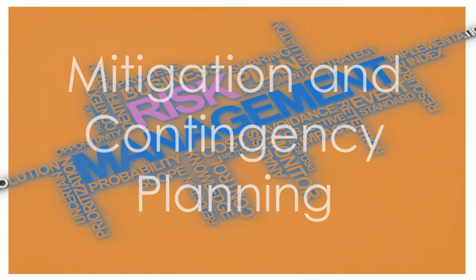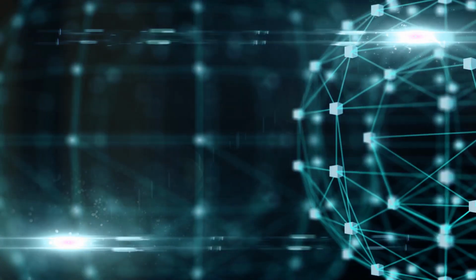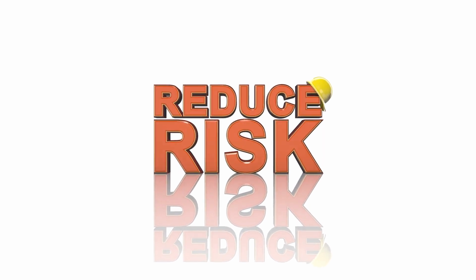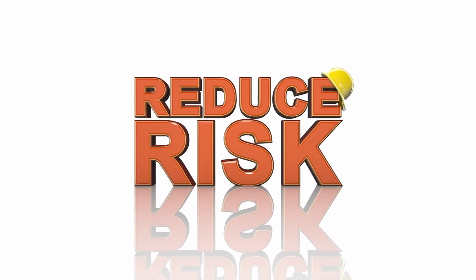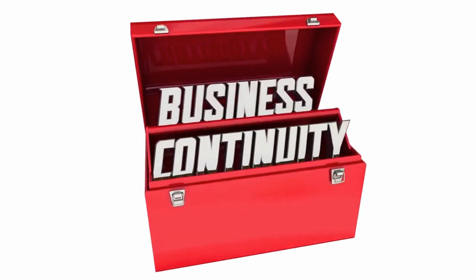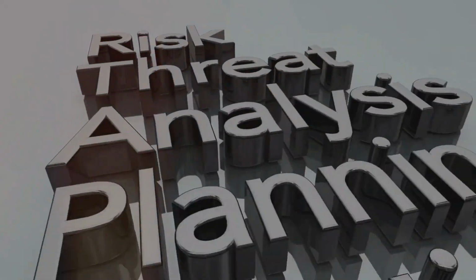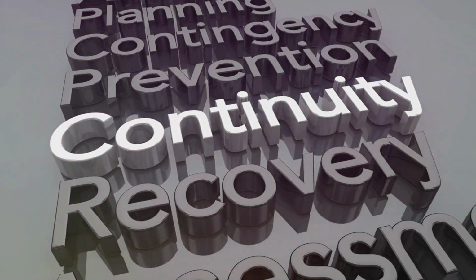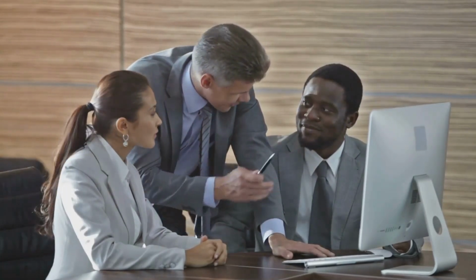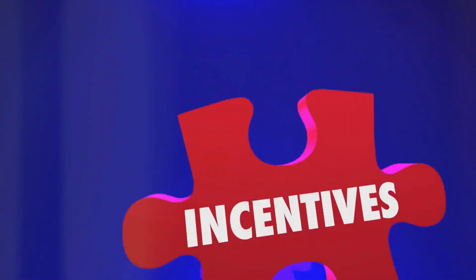Once you've identified potential risks, it's time to build your defenses. This means developing a robust risk mitigation plan that outlines specific actions you'll take to reduce the likelihood or impact of each identified risk. Think of it as your insurance policy against potential disruptions and setbacks. For example, if you've identified resistance to change as a potential risk for your CRM implementation, your mitigation plan might include providing comprehensive training to your sales team, establishing clear communication channels to address concerns, and even offering incentives for